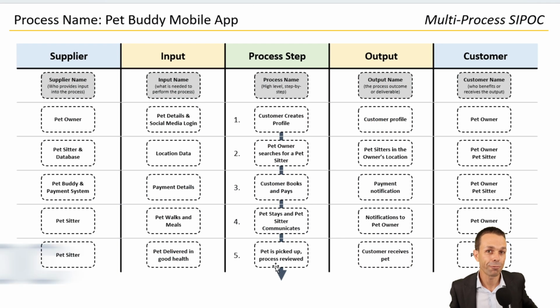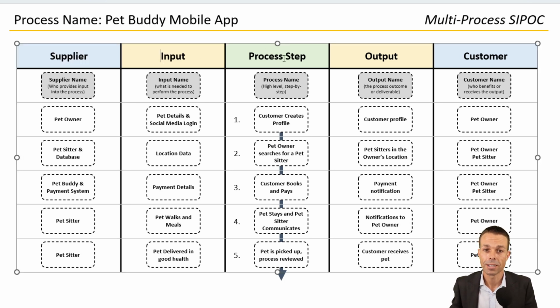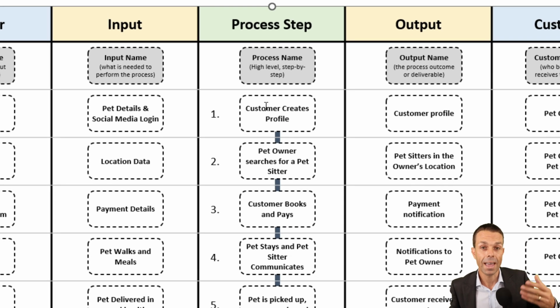Our next one in figuring out the customer process, or the process for our mobile app as it flows through in the customer journey, is a SIPOC, which stands for Supplier, Input, Process Step, Output, and Customer. When we're saying supplier and customer, it's for the actual process step itself. So we usually outline the process first, step by step. How is the customer going?